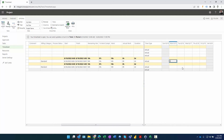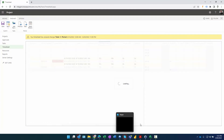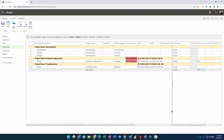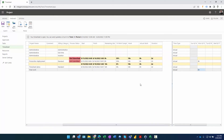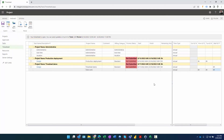If I scroll over I can see zero percent work complete - that's because 16 hours are scheduled and I haven't entered any actuals. If I enter 8 hours, the percent work complete will change to 50% since scheduled work is 16. I'll do a Save there. Scrolling over: actual work is now 8, percent work complete is 50%. I'll enter another 8 hours on that task and 8 on the other one, then Save again.